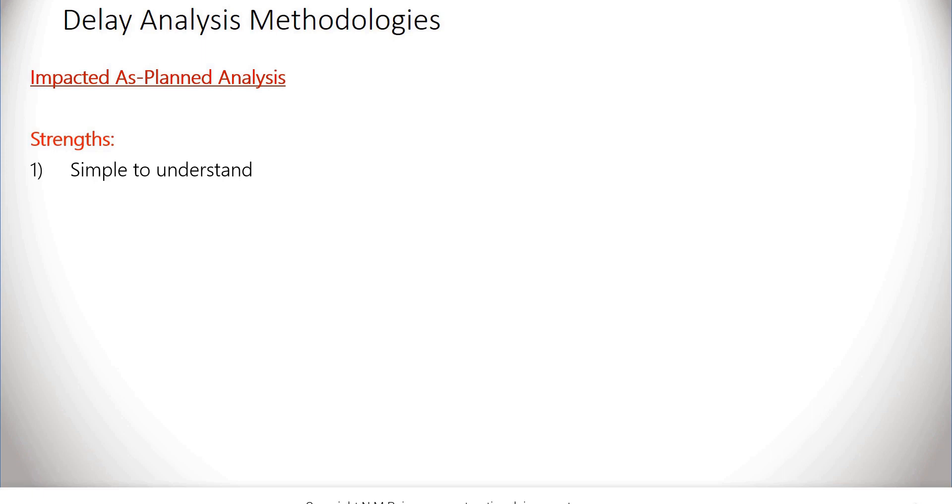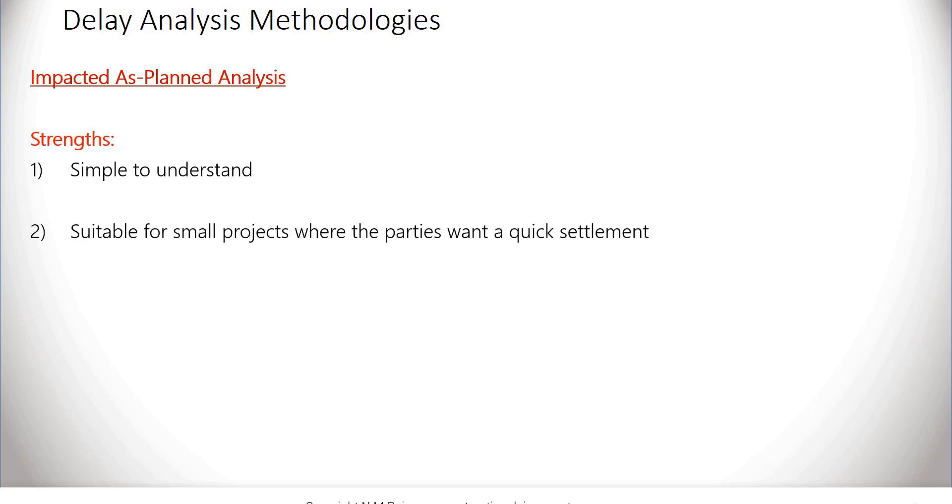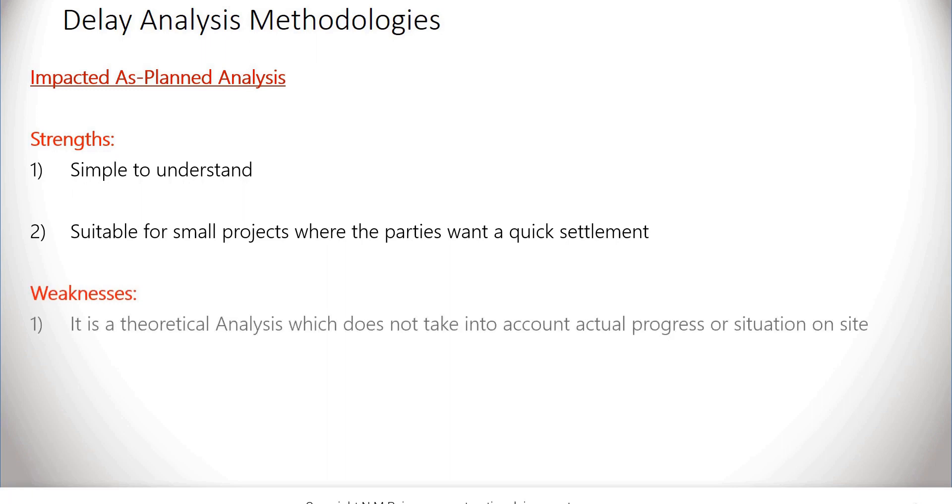What are the weaknesses? First, it is a highly theoretical analysis which does not take into account actual progress or situation on site, and second, it is difficult to analyze and allocate liability for concurrent delays.